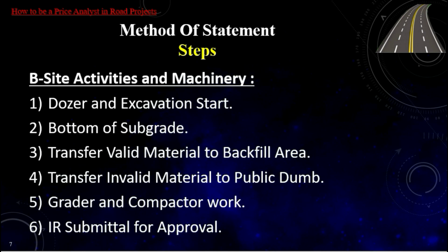4. Transfer invalid material to public dump. Invalid materials are immediately transported externally to public dumps using a loader and dump trucks. Enumerating the internal and external trips of each dump truck is a must.